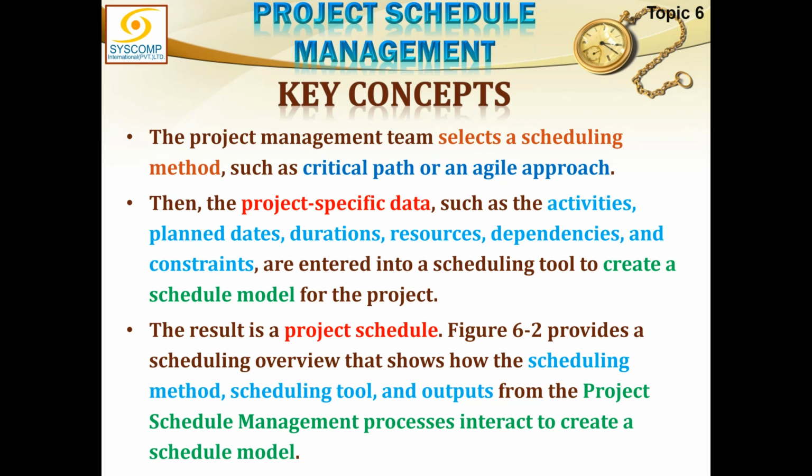So far, I have not talked about the schedule being final, but even before it was final, it had gone through hundreds and thousands of various shapes, and all those shapes are important for us to remember. Therefore, I am keeping a version control on them and configuring them all together, putting them in some database, and I have the data stored separately and the schedule model instances, various model instances, stored separately.